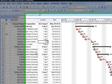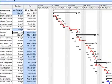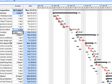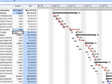If you see in the Gantt chart, the red bar increases its size and changes to three days duration, but the black bar is still consistent and remains to be of duration one day. Now I can very well see the variance. I can very well understand as to what I had planned and what is happening currently.